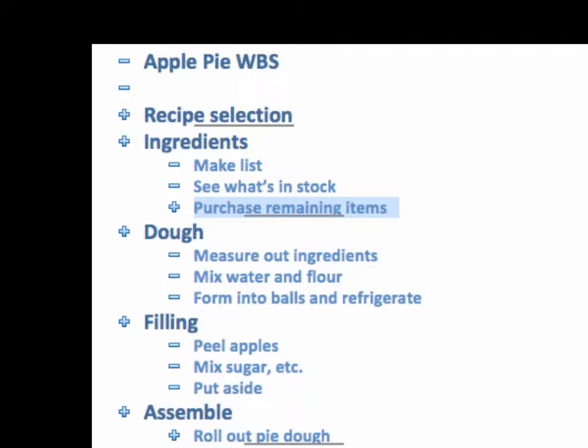Here is the dough: measure out ingredients, mix water and flour, form balls, and refrigerate. Because of my experience in making pie, I know that mixing the water and flour is going to take me about a half hour, maybe less. I really don't have to give any more detail here — I don't have to say go to the sink, fill up a jar, make it ice water, and so forth.